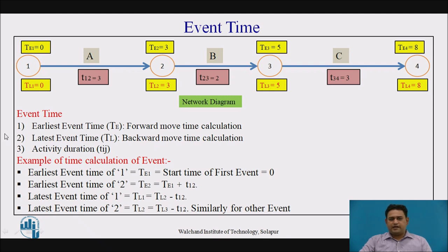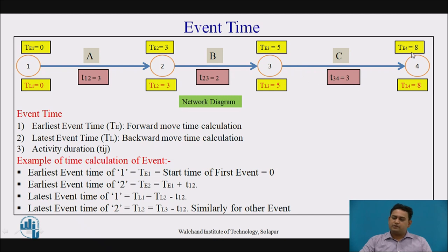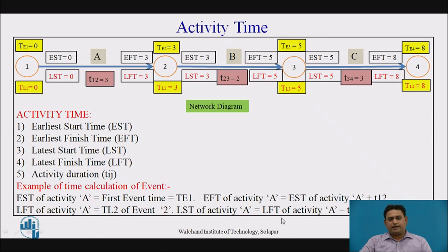TE1 is equal to 0 because it is the starting event. TE2 is 3, because 0 plus 3 equals 3. Similarly for forward events: 3 plus 2 is 5, and 5 plus 3 is 8. We carry the earliest event time of 8 to the latest event time, so 8 minus 3 equals 5. Now let us see the activity time.